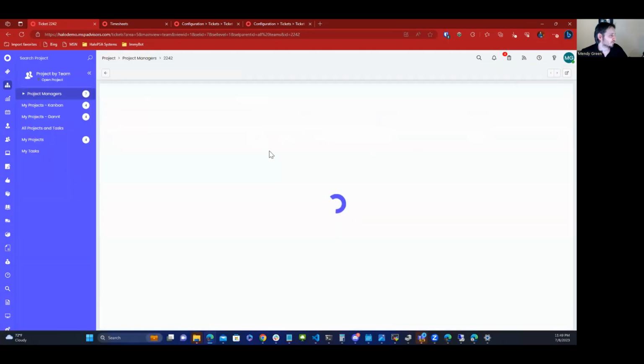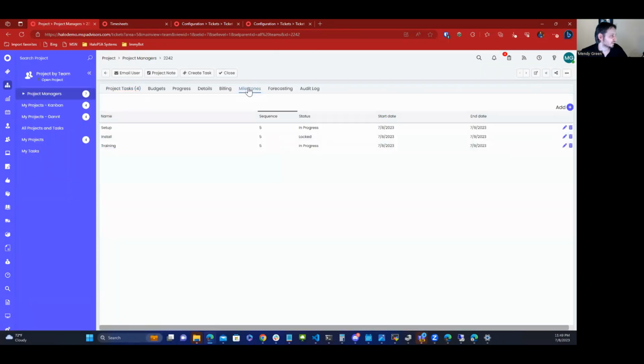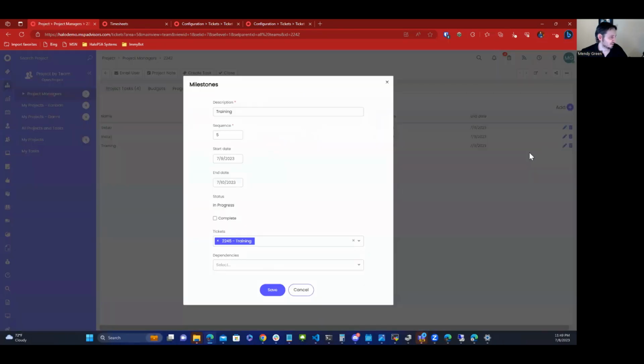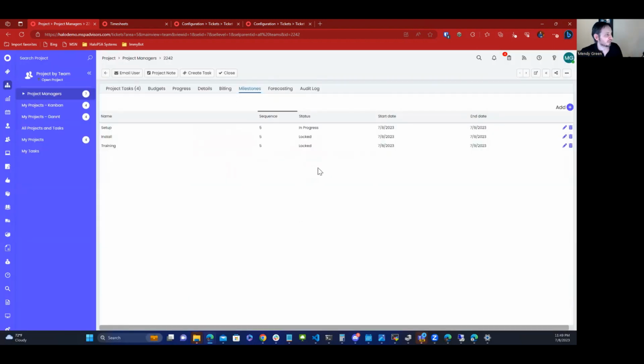Oh, there was a message that I missed. It just took a minute. Let's see if that applied. Nope. Let's do it again. Setup, install. There we go. And so now we've got setup, install, and training, and install and training are locked until setup is complete.